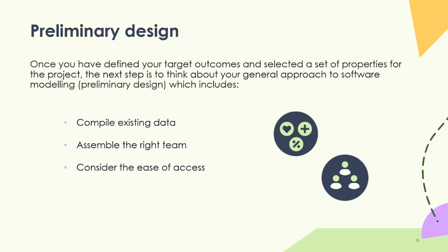And I was speaking to a social landlord this morning, and one of the ways that they did this is by warming their residents up to the idea of retrofit and their sustainability plans, even though they might not have been selected yet for this particular program. If you start warming them up now, it feels a little bit easier when they get asked if they want to take part in this program. So thinking about resident engagement early on will really help with that preliminary design.